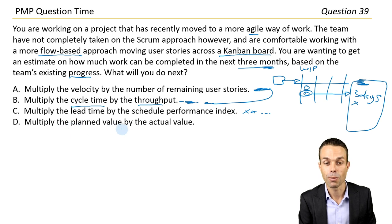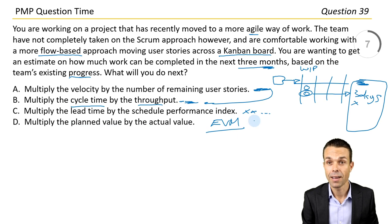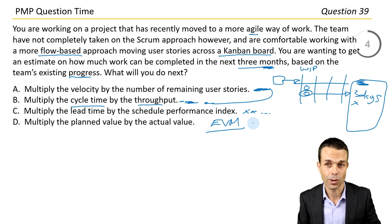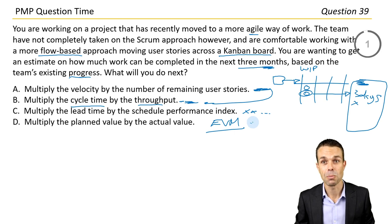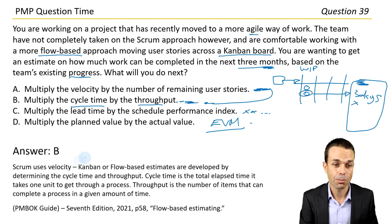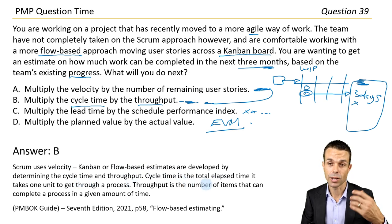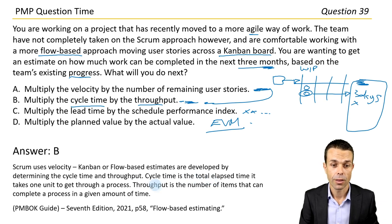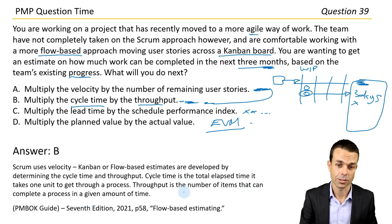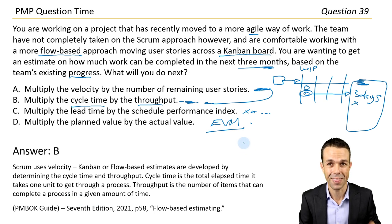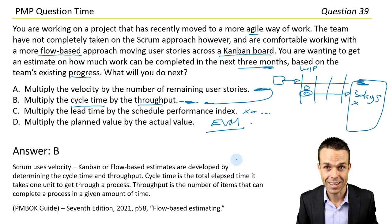Multiplying the lead time by the schedule performance index is a red herring. Multiplying the planned value by the actual value is earned value management — relevant for other scenarios but not this one. Answer B. Scrum uses velocity. Kanban or flow-based estimates are developed by determining the cycle time and throughput. Cycle time is the total elapsed time it takes one unit to get through a process; throughput is the number of items that can complete a process in a given amount of time. Page 58 under flow-based estimating.